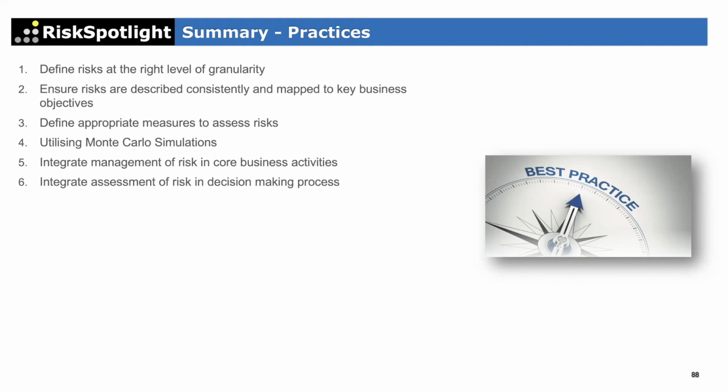Integrate assessment of risk in the decision-making process. If you don't do any of what I have talked about, if you just do this one thing, it has the potential to significantly change not only the quality of the performance of your organization, but also the quality of risk management in the organization. If you wanted my favorite, this would be it, number 6. Just identify where those big decisions are being made and integrate thinking about risk in those templates and processes.